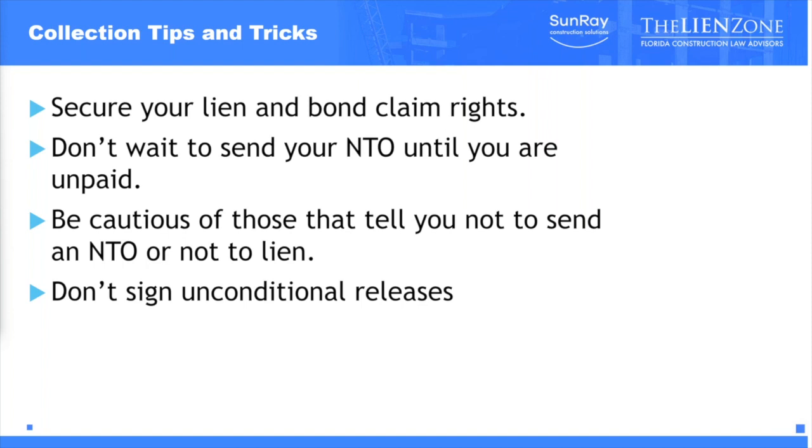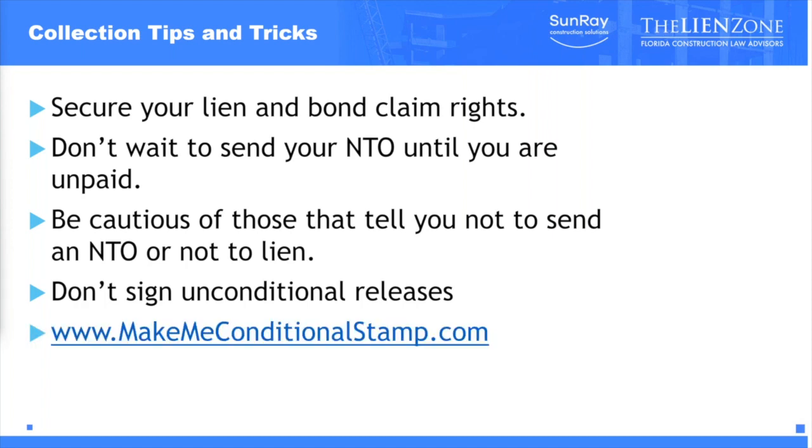So this is not a whole video on releases, but just be aware that if someone is giving you a check in exchange for a release, there's the possibility that that check is no good, has not sufficient funds, or they put a stop payment on it. Or even worse, if you send them a release based on the promise of a check, you may never get the check. And if your release is unconditional, then you will have given up those rights.